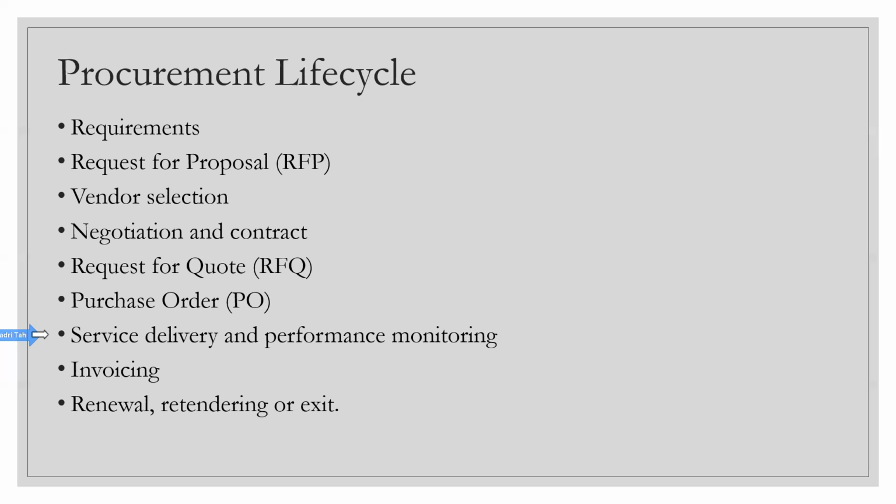Now the vendor will not be having everything stacked in some warehouse. How Cisco works, for example, is that once you generate the purchase order, they will load it into their tool. Once the loading is done, then they can track it. Loading done means they will get an alert in their factories that, okay, Amazon has ordered 200 Cisco phones, so let's start manufacturing them. And once the manufacturing is done, then they will start the shipping. So from manufacturing till shipping, the Cisco tool will be showing that.